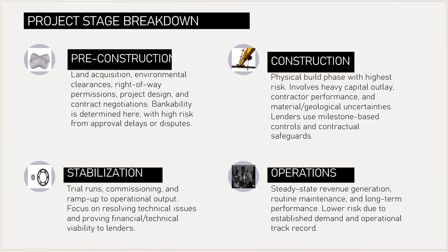Next is the construction stage, which represents the most risk intensive period due to heavy capital outlay, contractor performance uncertainty, volatility in material prices, and geological surprises. Lenders at this stage closely monitor progress through an independent engineer, milestone based disbursement, and contractual safeguards such as fixed price EPC agreements and liquidated damages clauses.